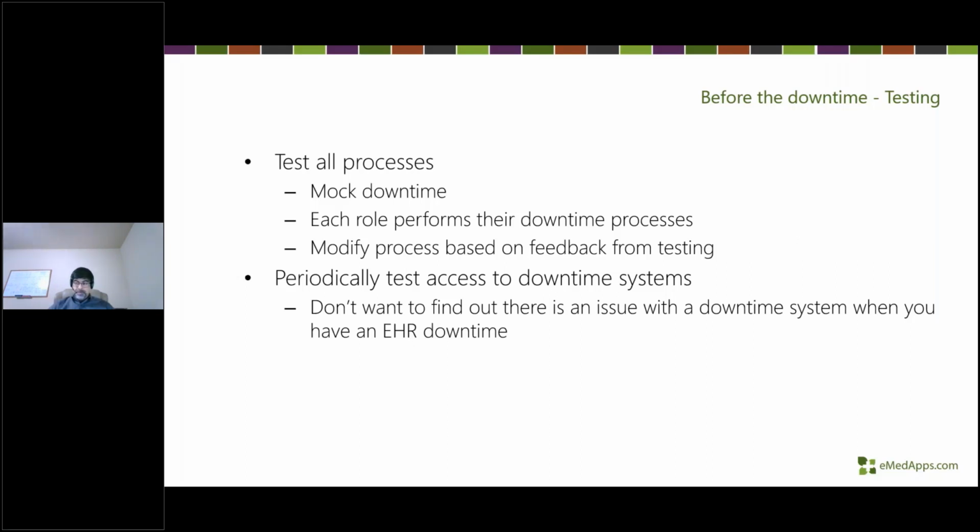Make sure that you're able to see patients. They're able to go through the different procedures that are in place, and they're able to execute them the way that they're supposed to be executed. You may find that you have to modify your downtime process based on this mock downtime. You know, everything is great in theory, and then when you try to put it into application, you find holes in the process. You find things that you hadn't thought about or weren't incorporated in the plan that need to come in here. So this becomes sort of an iterative step here, where you're doing your testing, you're finding issues, you're modifying the process, and then you may have to do another test to test the procedures as they go through.